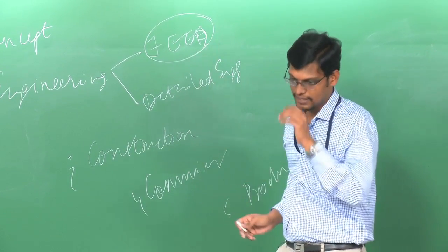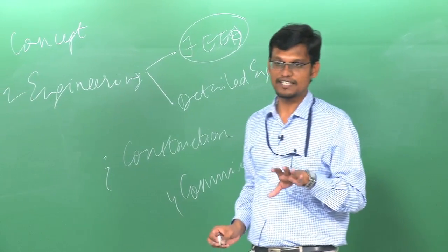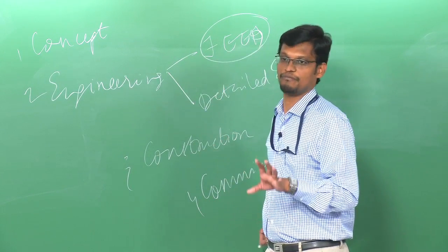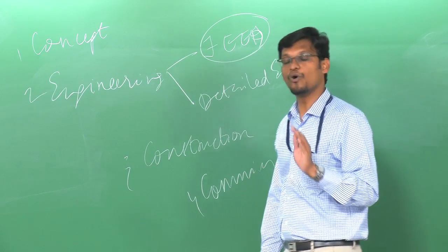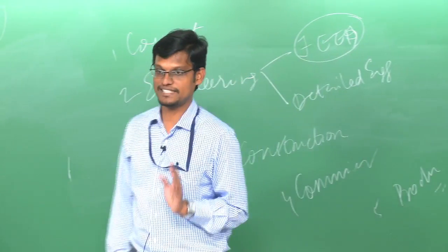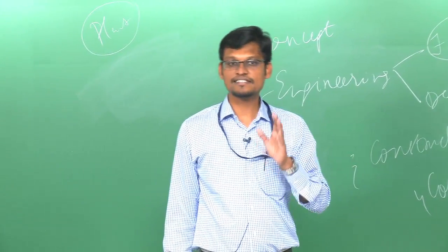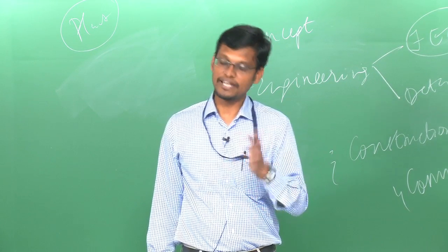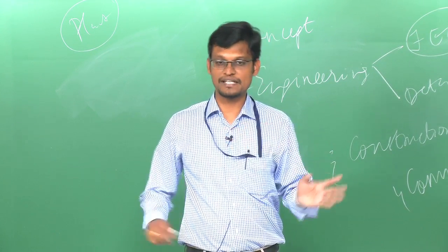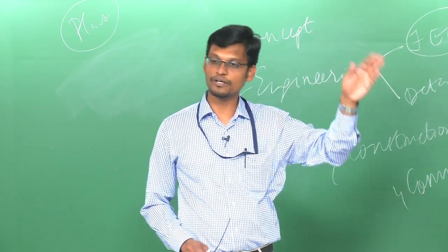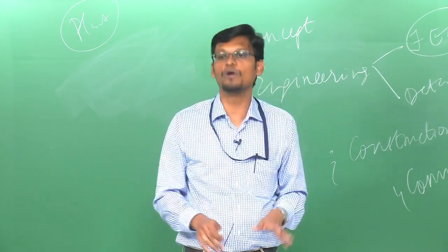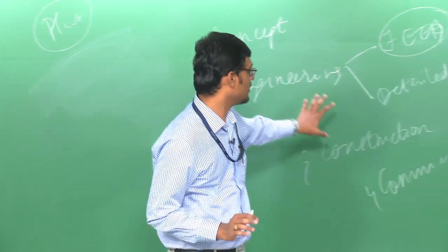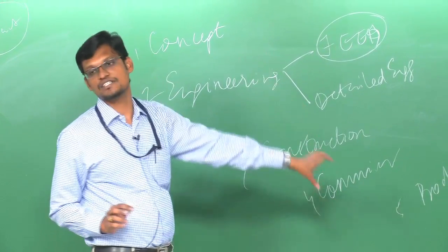So, what happens is all these hazard identification techniques are applied at various stages of the project, so that you do not have a surprise tomorrow when you operate a plant. Please understand. There is a lot of limitation the moment you start operating. You start operating a plant and I, as an external expert, come and say no, these are the risks you have not addressed, you include all this. You can't shut down the whole plant and change the whole design. That is not going to happen. Okay, so this is where integration of safety at various stages comes into the picture.